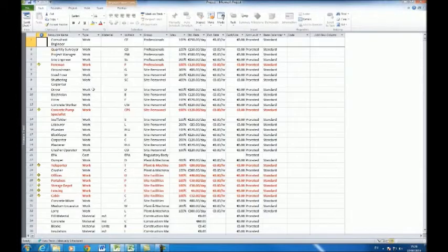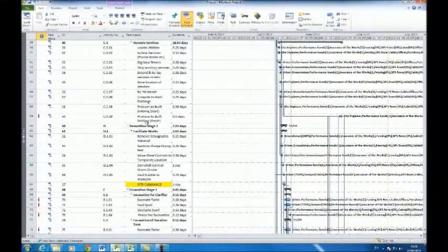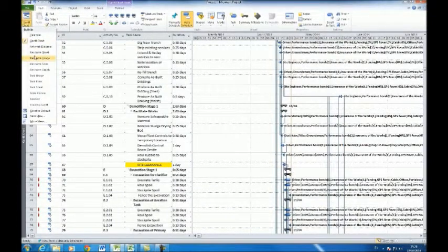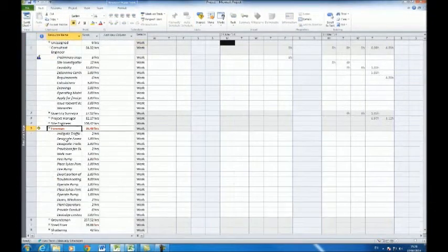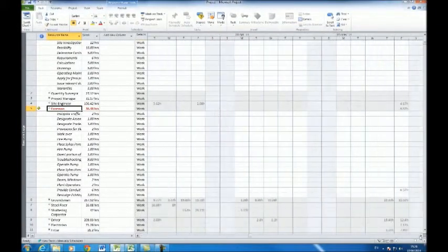Here the over-allocation of resources can be resolved in one of three ways. 1. Increase the number of resources in the Resource Sheet tab. 2. Proceed to the Resource Usage sheet, and check for over-allocation in terms of hours. Over-allocation can be identified by being highlighted in red.